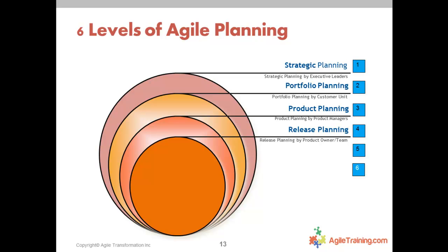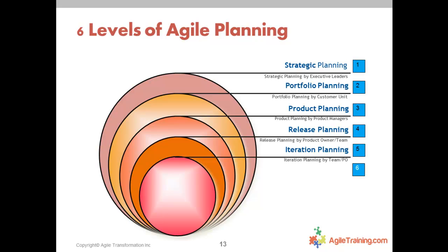So this is where we say, all right, let's take that item and break it down into stories, and this is normally where you have a team involved. Think of these 3 steps as things that happened in that life cycle diagram at the very first and second step. Release planning is where the team got engaged in that yellow box, and now they're starting to plan out their work in much smaller items. Iteration planning is because a release is made up of multiple fixed sprints or fixed iterations, where we now take the work and slice it into the iterations like that picture I just showed.